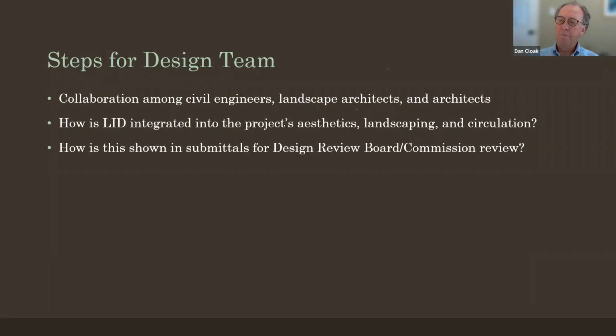And then carrying that forward, instead of it just being an idea, I'm thinking, okay, well, when this goes to the design review board, we want the LID to be fully developed, or pretty much fully developed, except for maybe drawing the cross sections. And we want to show the design review board or the design review commission, which most projects that meet the regulated project criteria are going to go through, how the LID works with the landscaping, with the site design, with the circulation, all the things that they're reviewing.